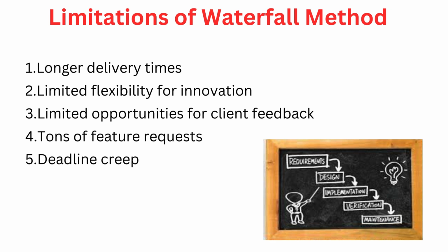And since clients are not involved during the design and implementation, there's no client feedback on what the team is building until they see the whole software before production release. So if the requirements are misunderstood and misdocumented, the system built will be different to what the client really wants, and it will take another long time to get it rectified, with huge extra cost and extra time as well.